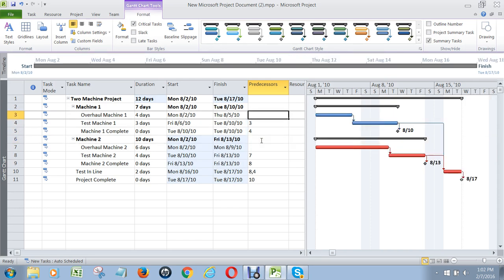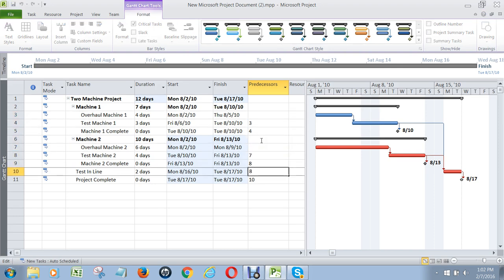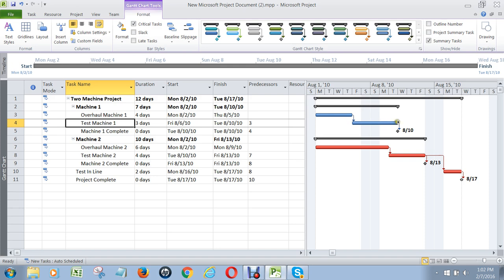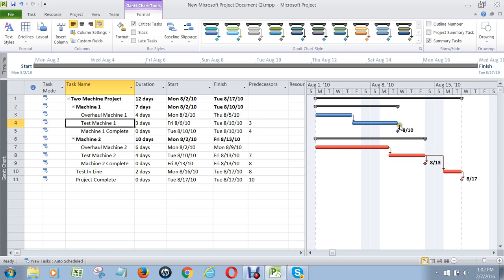The other problem is what I call dangling nodes. For example, this is a dangling node. Do you see how this task right here — test machine 1 — it does go down to a milestone, but it doesn't link into any later task in the project network? That's a dangling node. So you have to go and look and see whether you have any bars that don't have arcs that feed into other later tasks.